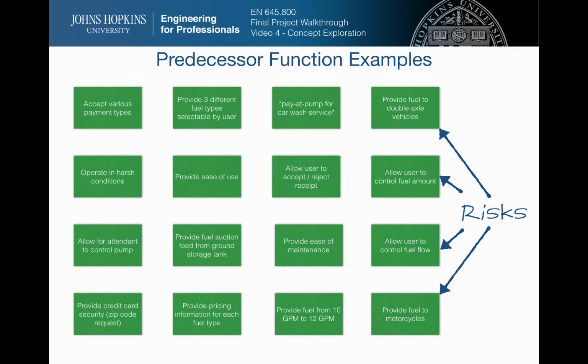In the end, I chose this path and briefed that this requirement can be passed on to another increment, since the primary purpose for increment 1 will be to prove out the concept from both a technical and a return on investment perspective. Spending a lot of extra time and hypothetical money on making the system solve even more complex problems than necessary increases the technical risk and lowers my return on investment.